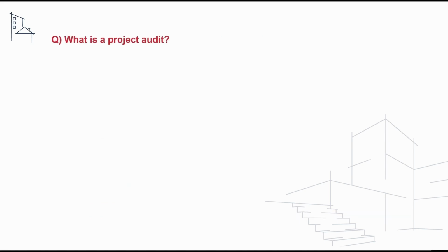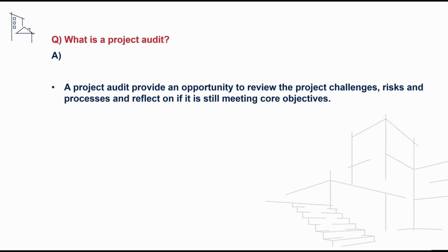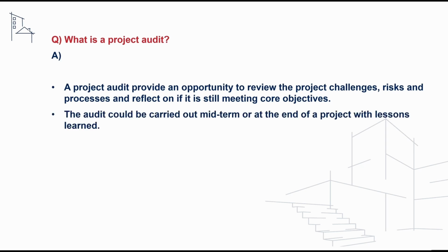The next question we'll take a look at is, what is a project audit? And to address this, we can say that a project audit provides an opportunity to review the project challenges, risks and processes and reflect if this is still meeting core objectives. The audit could be carried out mid-term or at the end of a project when lessons learned are established.